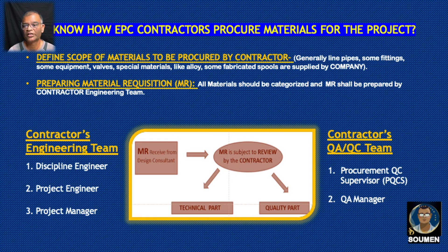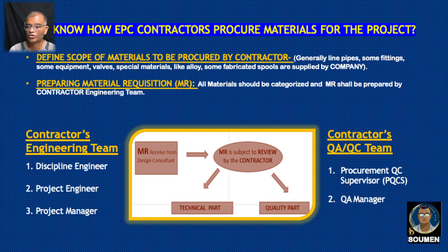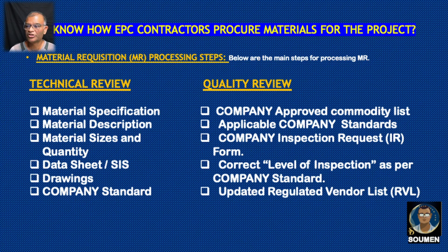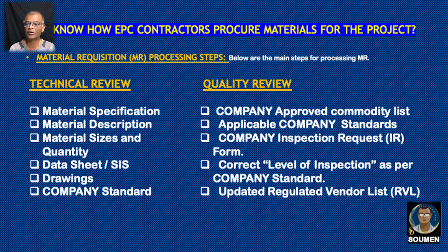All the valves, pipes, fittings, electrical materials, and telecom materials will be segregated and sorted in a disciplined way, and the MR will be prepared. The material requisition is provided by the company, and the technical and quality parts will be reviewed by the contractor engineering team. Then it goes for further approval. What to review technically includes: material specification, material description, sizes, quantity, data sheet, safety instruction sheets, drawings, and company standards. The engineering team and quality team check if it complies with project requirements.